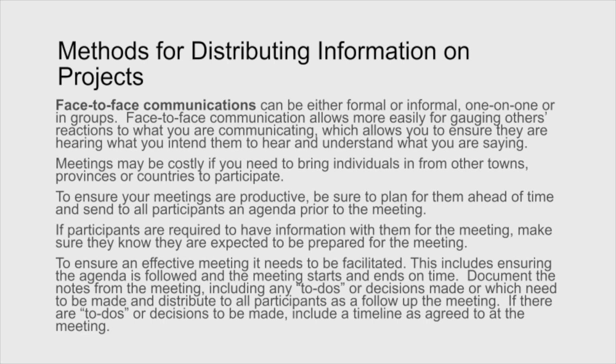We also need to think about the meeting itself and how the meeting is handled. Meetings often need some sort of facilitation. Someone needs to manage the meeting. This includes ensuring the agenda is followed, and the meeting starts and ends on time, and the documentation is covered, and the to-dos and the decisions are recorded. That's important. So if there's lots of to-dos, we need to assign those to-dos to somebody and set a hard timeline on them.